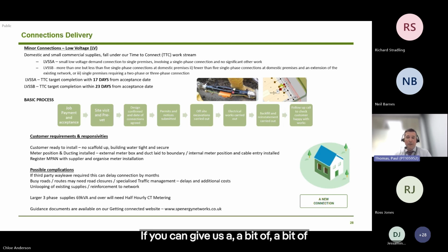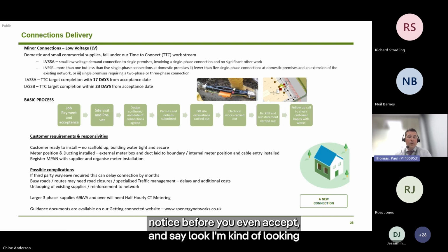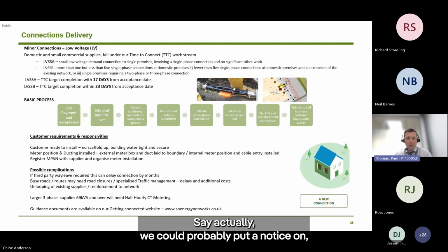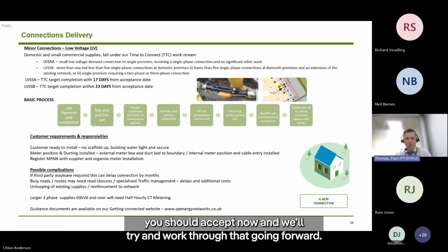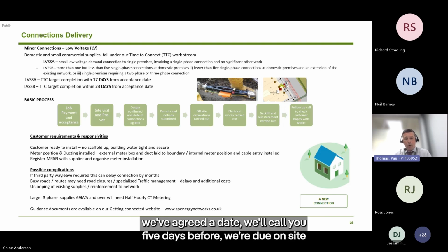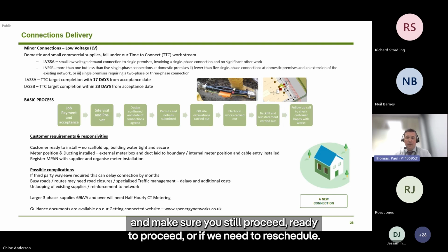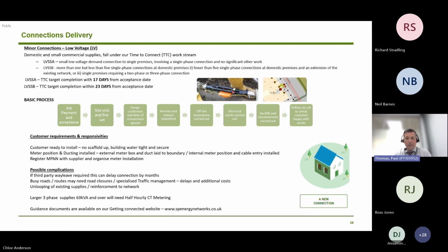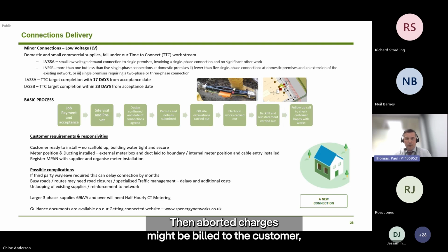If you can give us a bit of notice before you even accept and say, look, I'm looking at accepting around this time, feel free to do that, and then we'll have a look and say actually we could probably put a notice on, you should accept now, and we'll try and work through that going forward. Once we've agreed a date, we'll call you 5 days before we're due on site to make sure everything's okay and make sure you're still ready to proceed, or if we need to reschedule. It's worth noting, if any cancellations are after 5 working days, then aborted charges might be billed to the customer. So please keep that in mind when you're booking in work.